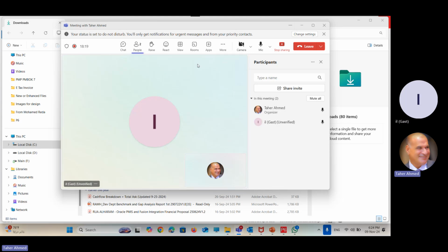Why do we create the calendar first? Because when we start adding a new project, one of the pieces of information we need as a default at the project is which calendar will be used in this project. Now we are ready. We have the enterprise project structure. We have OBS. We defined the calendar. It's time now to add a new project.